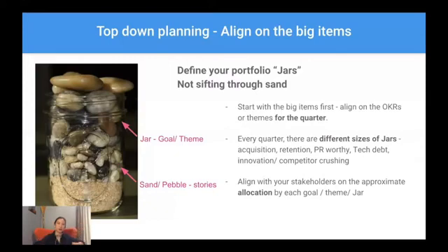What we really should do is to say, within the tech debt, A, B, C, D, and within the user acquisition, X, Y, Z, and then you compare their relative contribution to these goals. And then you would say, okay, we agree to invest 20% in tech debt, 50% in acquisition. Then you can basically have a budget in terms of resources and allocate it to each of the jars, and then you can prioritize within each of the jars. That would make a lot more sense, and it's a more apples-to-apples comparison versus comparing two things that are almost hard to decide.